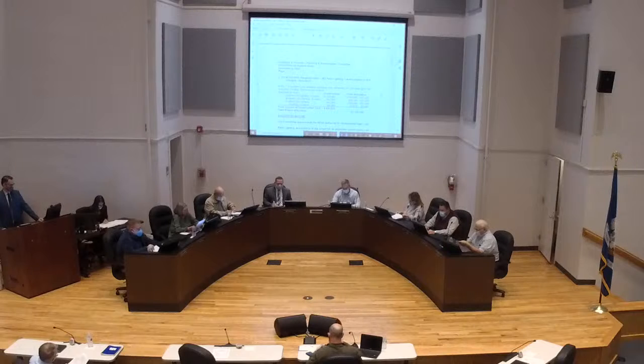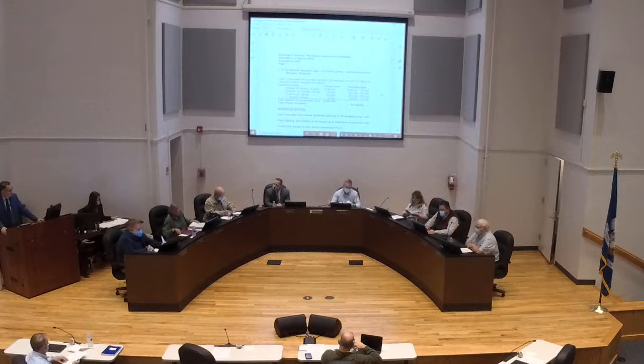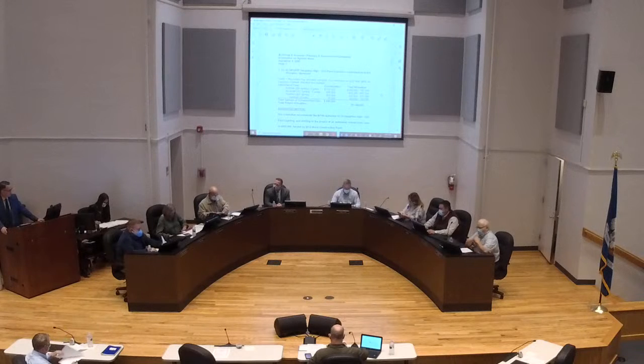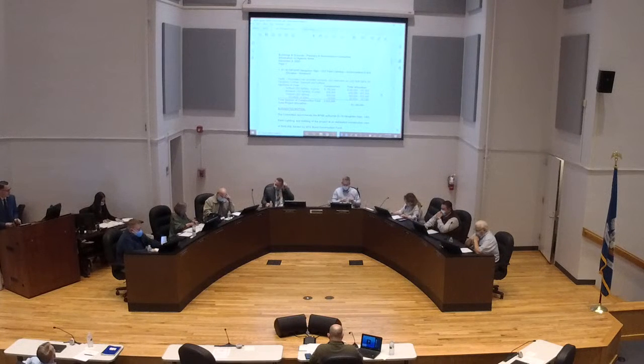21-18 CM 1405F Halton High LED field lighting authorization, Douglas Norwood. Thank you. This is one of two items where we're presenting options for capital improvements at Halton High School. You authorized us previously to do a preliminary study, so we're bringing that back to you. The first item is LED lights for softball, baseball, and football. The total allocation estimate is $1.1 million, and that's an $850,000 construction cost.